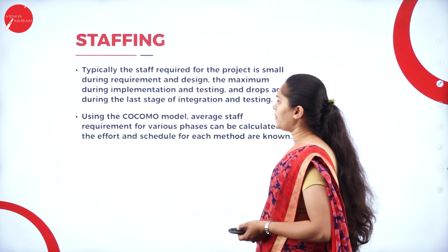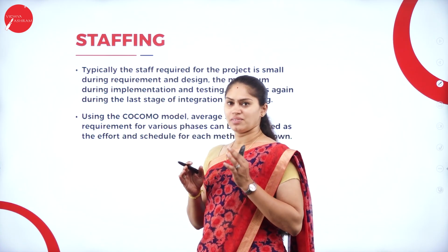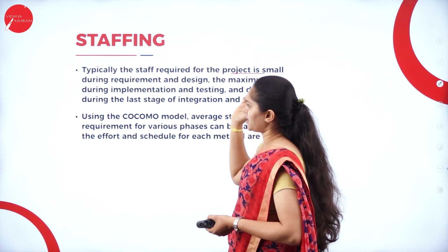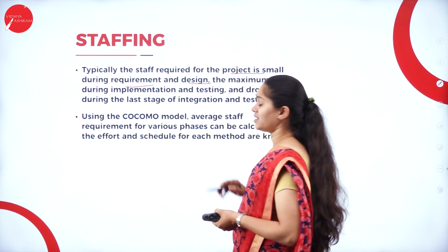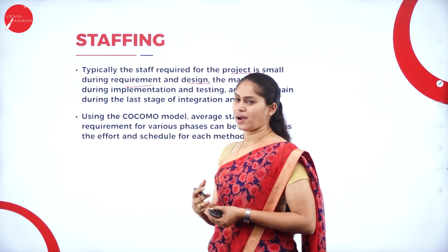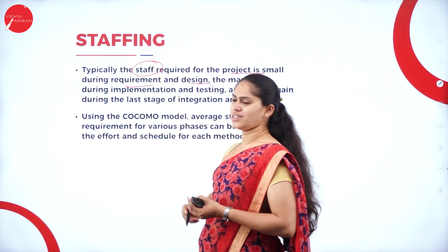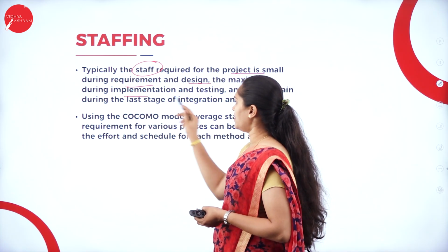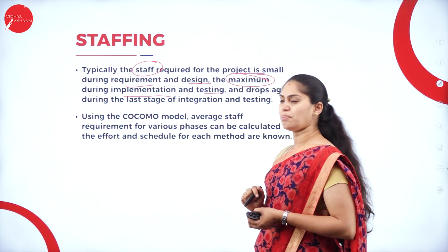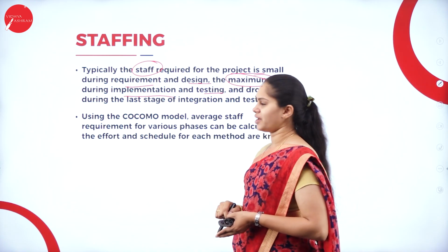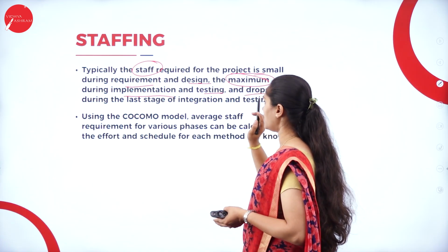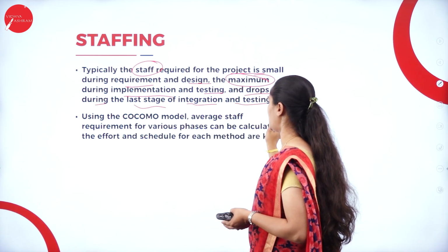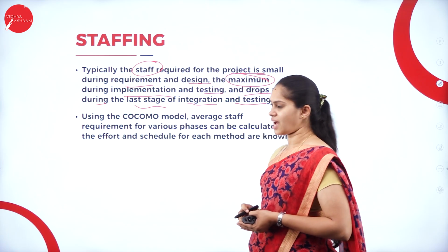As we all know, in the early stages of development, when the project is small, during requirements and design, that is the SRS and design part, we don't require much staff, only a small number. But when it comes to implementation and testing, we require the maximum number of employees or personnel for the development of the project. And at the last stage of integration and testing, we require more staffing here.